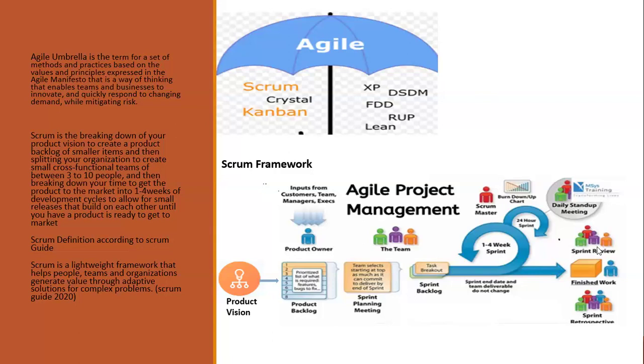They meet to inspect the outcome of that sprint, right? And also to see if they're going to make any changes by adapting, making some modification in the product backlog, right? That is what sprint review is all about. And the time box for sprint review for a 1 month sprint is 4 hours, right? But if it's shorter than a 4 week sprint, of course, you can make it maybe 1 hour, 2 hours, depending.